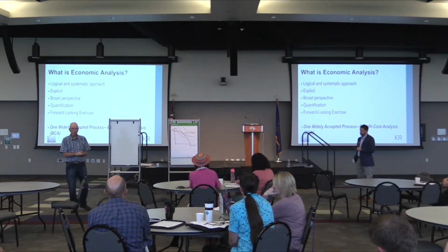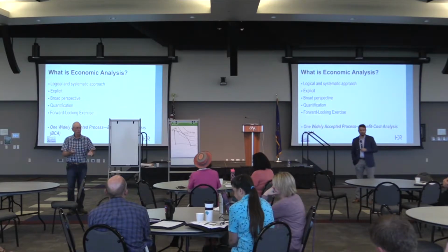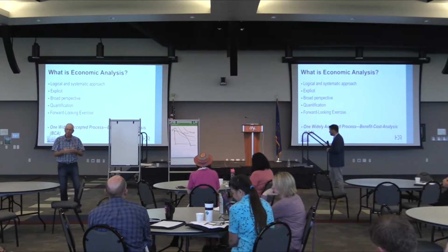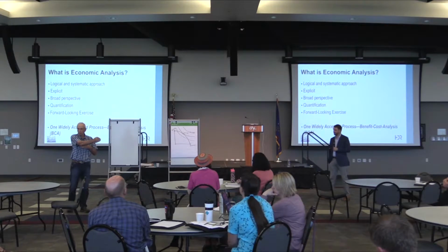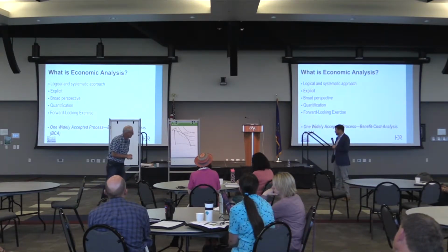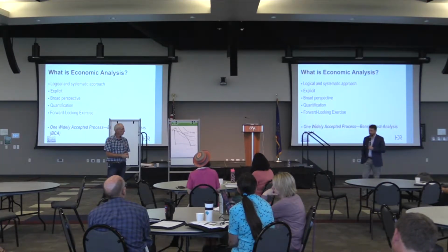We quantify things, and I'll talk about function versus benefit later, but if you say this project does wonderful things for cropland flooding, well, okay, how much? So we quantify it, and it's a forward-looking exercise. We start from today, and we go out typically 50 years into the future. And there's one widely accepted process for conducting economic analysis, that is benefit cost analysis.